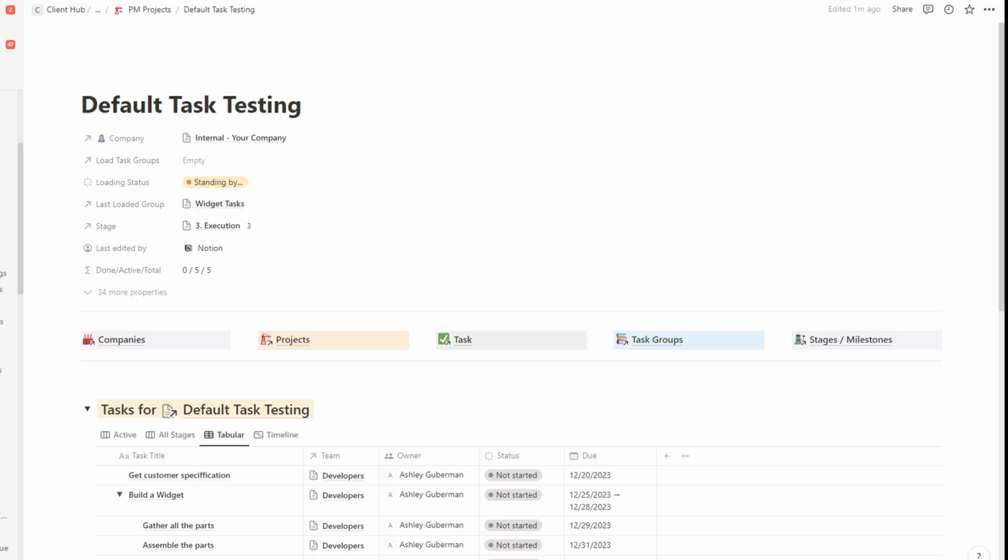The benefit to you of this feature is that you can fully define a group of tasks that you know you need to use on a recurring basis in multiple projects, and automatically have those tasks pulled into your project while respecting the individual milestone dates for each project. It saves you a tremendous amount of work.